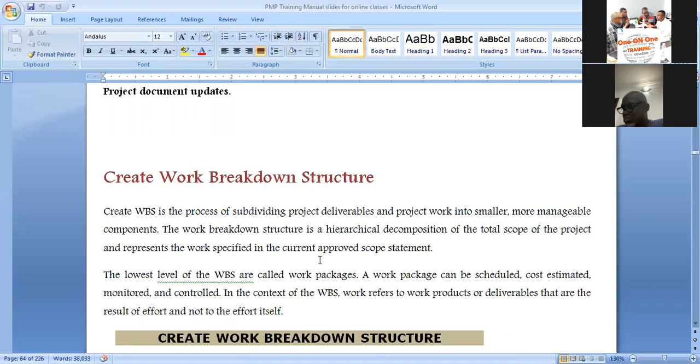Then we move on to the phase of placing the roofing sheet. And thereafter, we may still want to carry out our plastering and finish up with our electrical installation works. Then we paint. Before we paint, we install doors. So you are decomposing the project, the scope statement, into smaller and more manageable components. Having done this, you can now start planning.